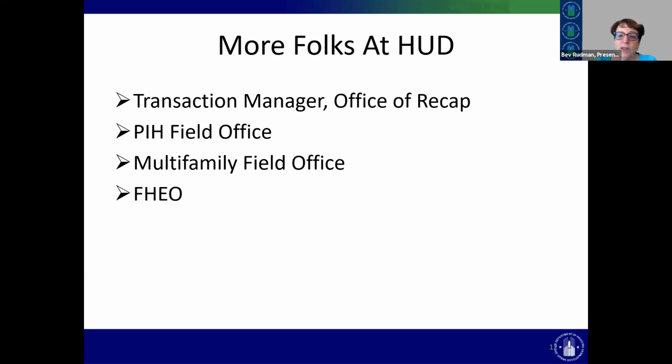The multifamily field office, we talked about a little before. If you are choosing PBRA or if you are doing an FHA closing with a PBV CHAP contract, you are going to have an account executive who's going to be involved with you forever afterwards. In PBRA, in these situations, they are in the closing period going to be looking at your documents that they need to have to continue to do the ongoing management. And those will be required to be approved by the field office.